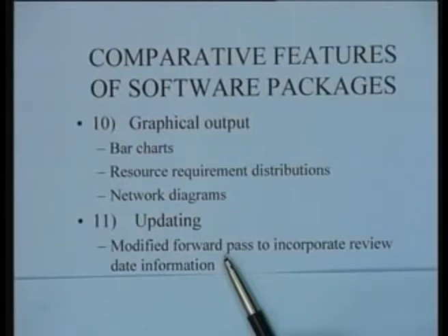Activities which are going on, an activity that was originally scheduled to take 10 days, you now estimate that portion of it is done, but it's going to take maybe 6 more days. And activities which have not been touched yet, their durations are as they were before, or maybe if you feel at this stage that they are going to take more or less, you can take a revised estimate.